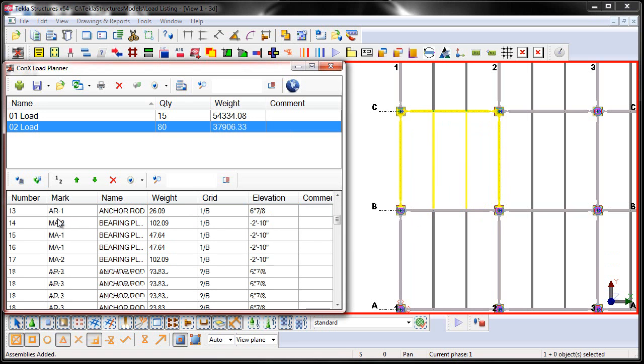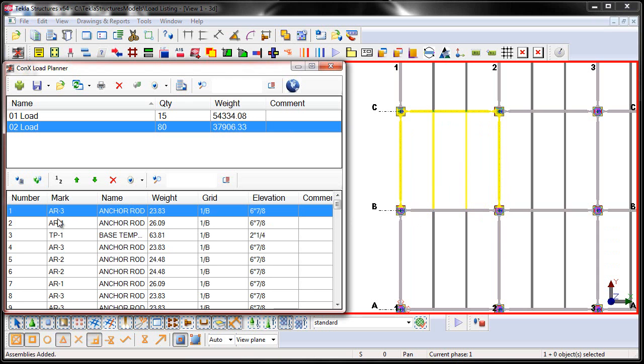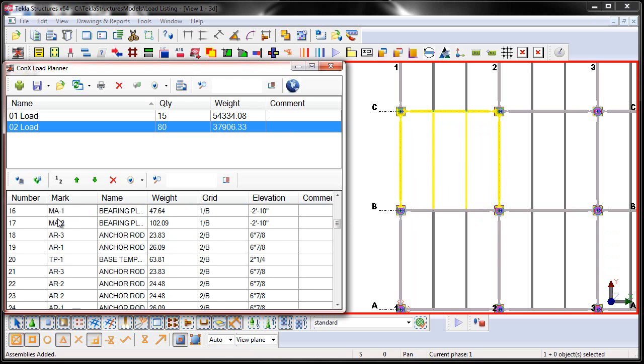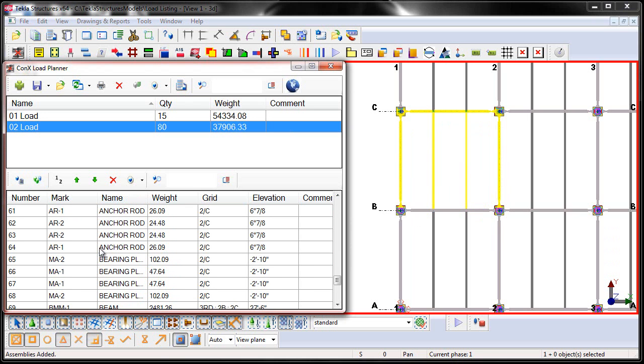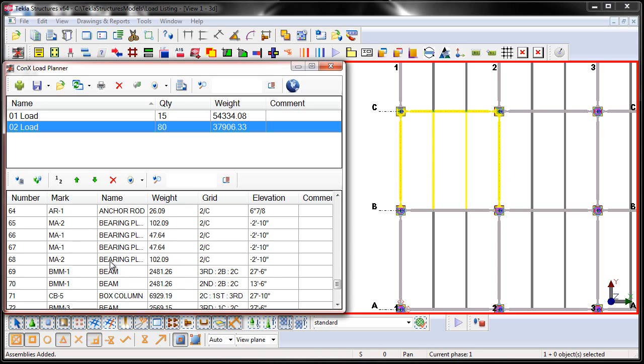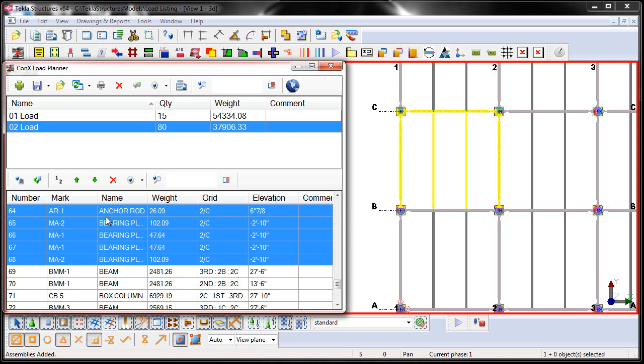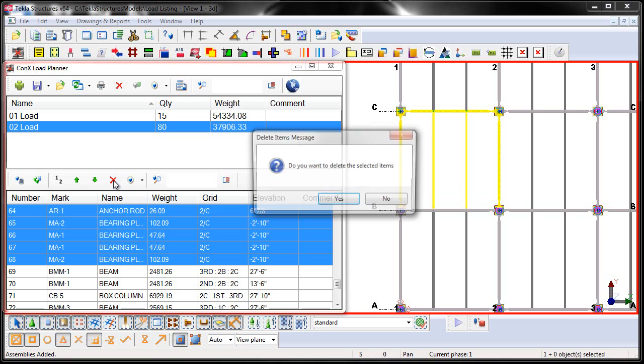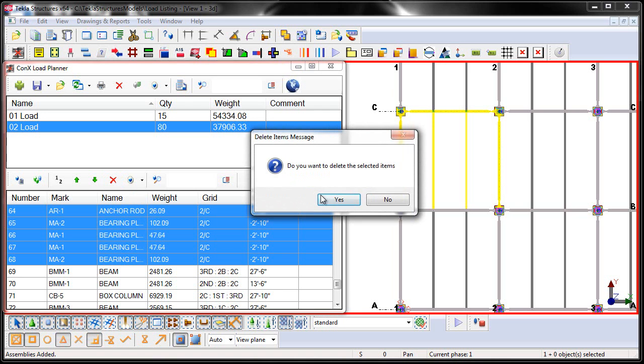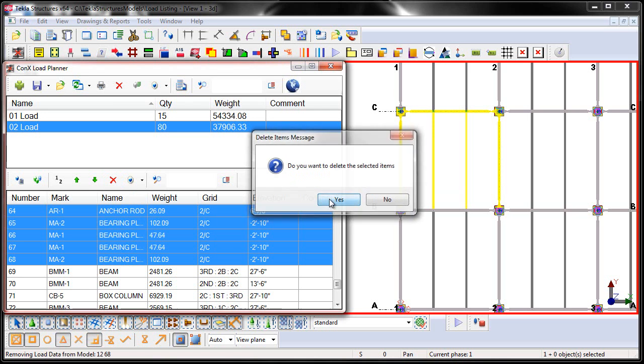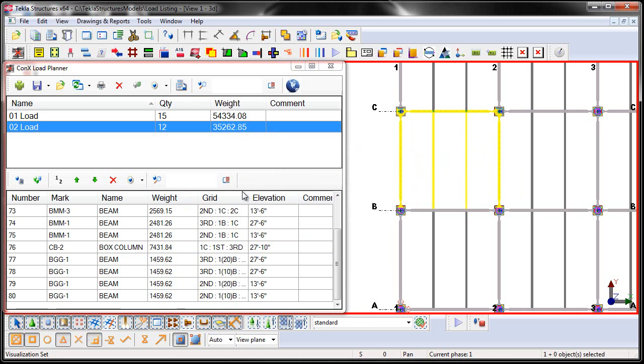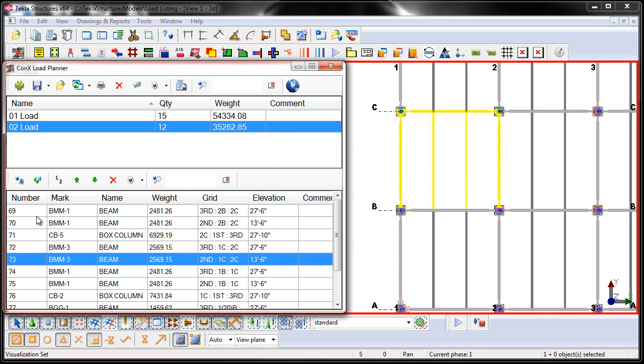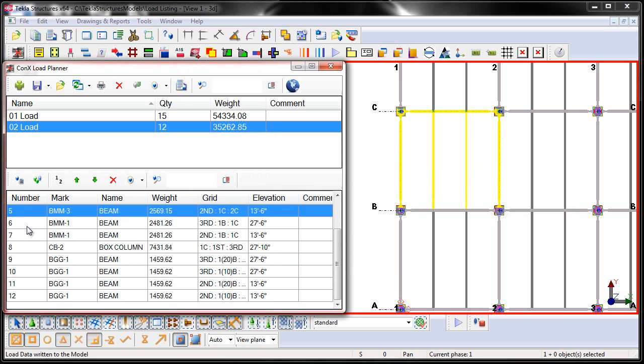Now in this particular case, I may not want to load list my anchor rods and templates. So I can either sort by the name and filter those out, or I can just scroll down here until I get down to Beams, and I'm just going to go ahead and select all of those, and then delete them from the planned load. This will then clear that status from the list as well as from the model. I'm then going to go ahead and just say Number These, so that way it updates the numbering, and then I'm going to go ahead and save. You'll now see that I have 35,000 pounds worth of weight on load number 2.